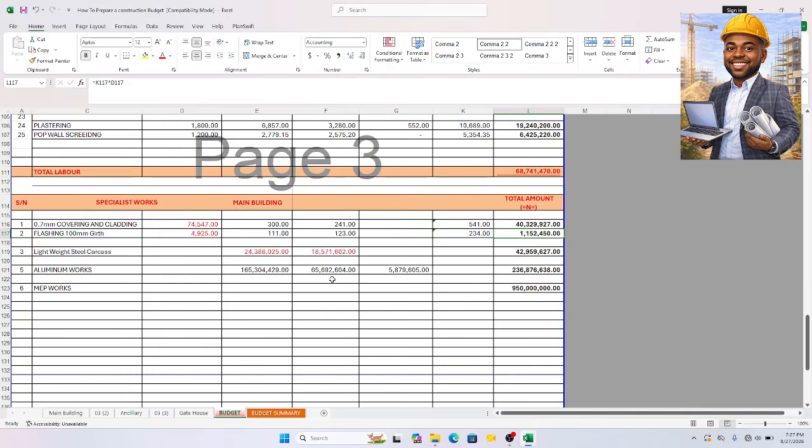Then I need to know what the area of one sheet is. I think it is 0.9 meter by 12 meters. That is one sheet. Then you divide the total area by the area of one sheet, and you know the number of sheets. Then you allow for lapping also, and then waste.